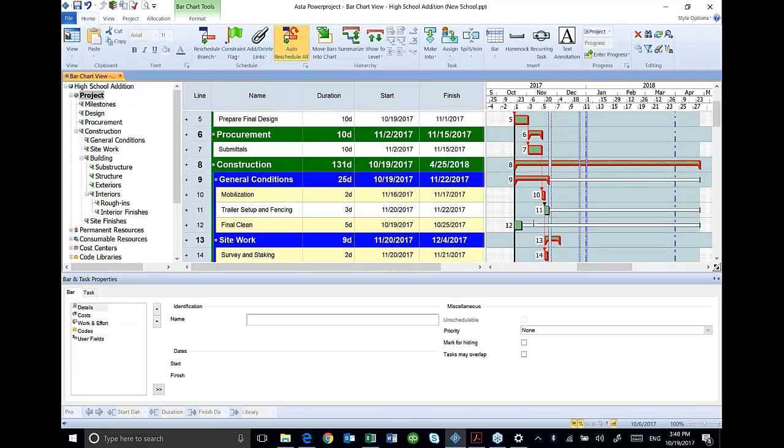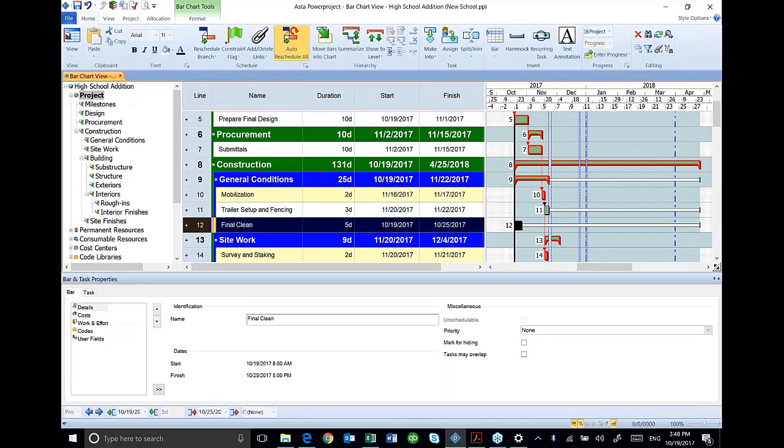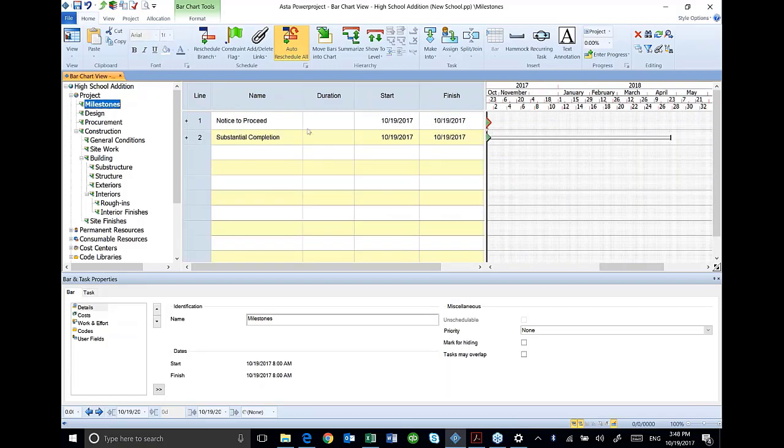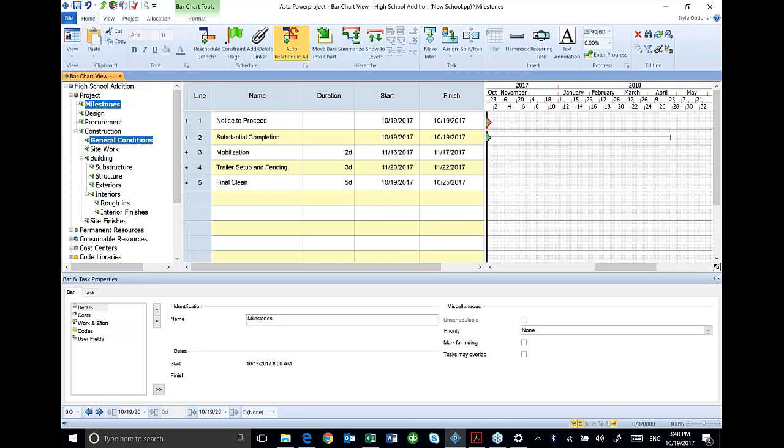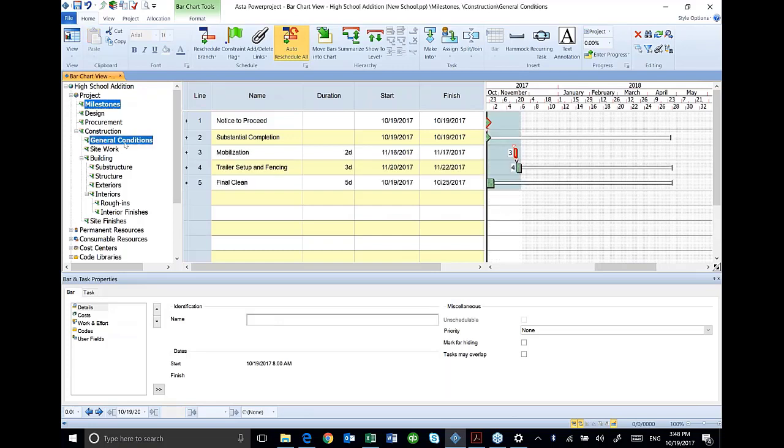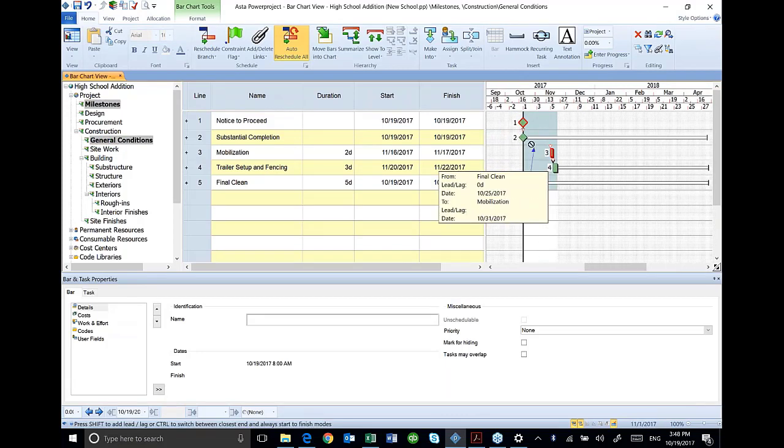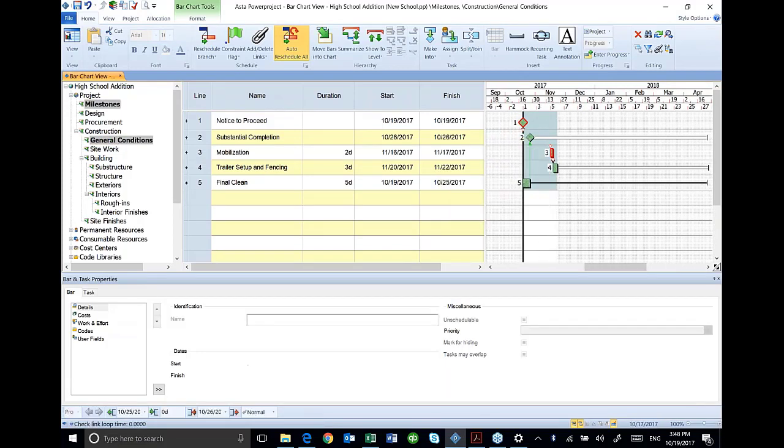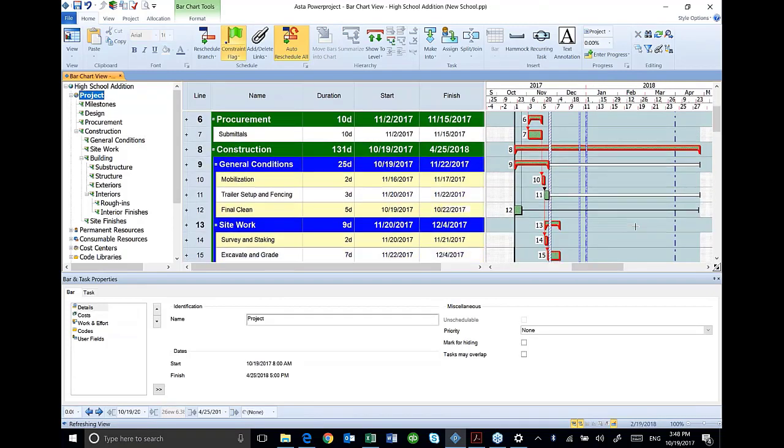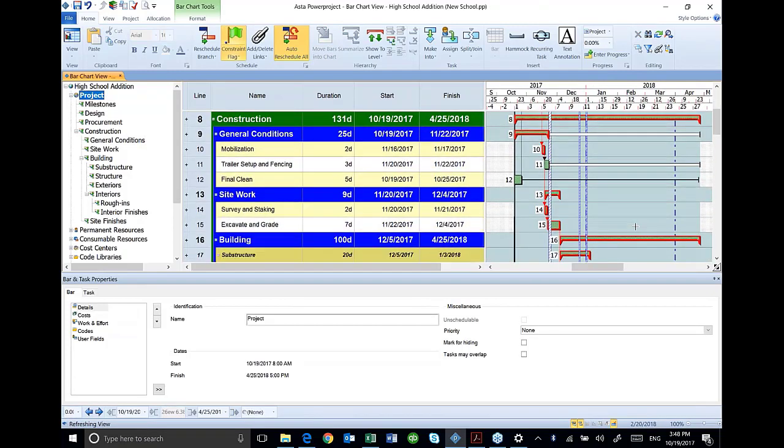In this case, my final clean, I'm going to tie that to substantial completion. So you'll notice in this phase, I'm going to be tying things to my schedule that are not really close to each other. So what I can do, here's where a nice feature is. I can select my milestones over here on the left. There's my milestones. I can select my general conditions, and it gives me my final clean, just the activities that are in these two selections. I can link those, like that. Then I click back up here on project, and I've got all of them in view again.